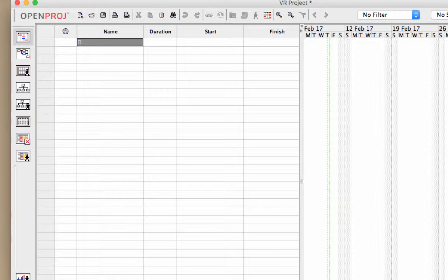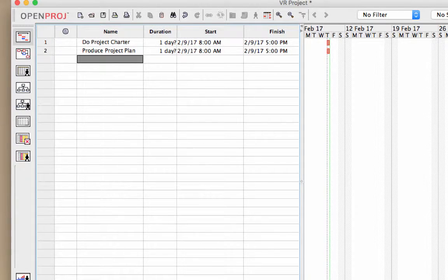So we'll say do project charter, and because it's a work breakdown, we try and put a verb in with each one. Produce project plan. Now, let's say after that we do the weekly reports. Produce reports.